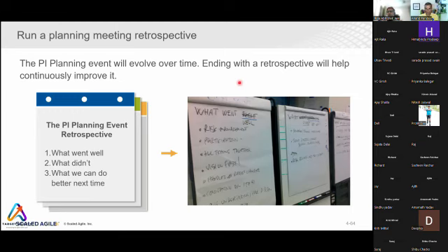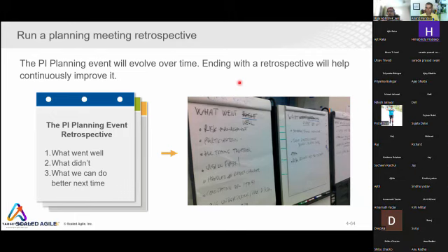In there I'm doing capacity planning, I need to match with my story and loading everything. Meanwhile, developers are going to clarify the doubts in that breakout session. What exactly are the developers doing in that particular breakout session? See, most of the doubts should be clarified during the refinement session only. Because if you go with refining the story during the breakout, then that is an anti-pattern.